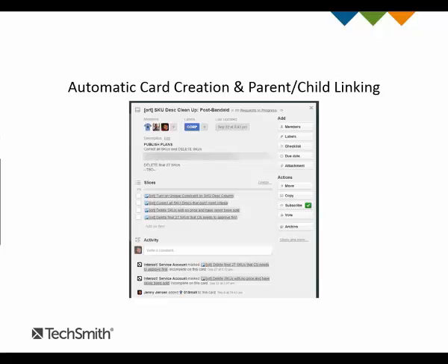Do you write the checklist first and it generates the cards from the checklist, or does it automatically populate the checklist? You have to write the checklist first, and then it will automatically populate from there, and it'll switch out the name of the slice that you put there with their short link, which is universally unique, and so it will only lead to that card. And they do a fun little bit of hocus pocus where it's a human readable link as well. So we didn't have to do anything to make it do that. Trello just does it, which is super nice.